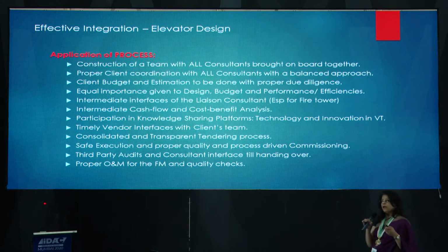I think this is where our Indian projects differ from international projects, because we kind of stage it. The client would say, why do you need the landscape architect now? Why do you need the VT guy now? Their job is going to start 2 years from now. Just get the architect, structural engineer, and the MEP engineer, and we should be going on the project. But that's not how things work.